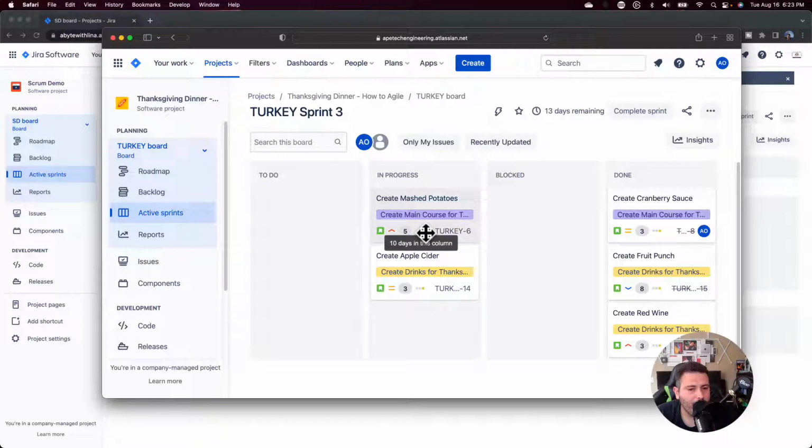And guess what? If something is in a particular status for, I would say, more than 3 or 4 days, and it's a low story point, if it's not that high of a story point and it's stuck in there for 3 or 4 days, we have a situation. And the situation is one of 2 things. Either A, the developer, yet again, and I feel like I'm bashing a lot of developers here, but the person, the assignee, let's just generalize it as the assignee, did not update their Jira like they're supposed to. Or B, they're really stuck and they didn't move it to blocked, or they didn't bring it up as an impediment. Both are not good situations for you to be in.